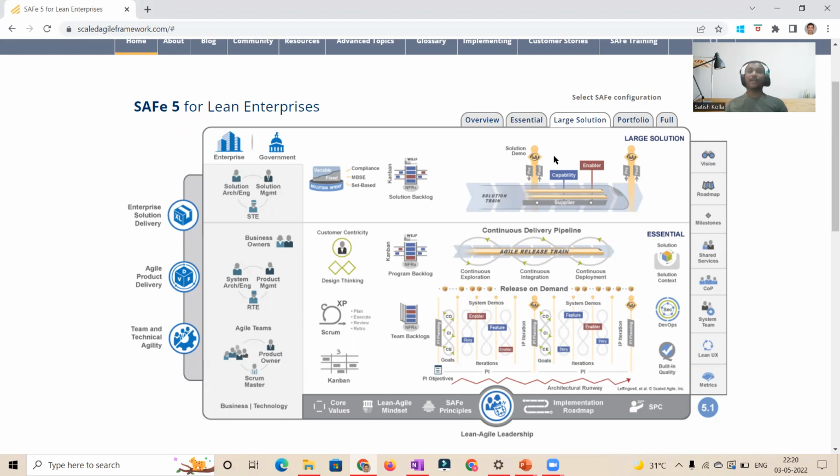third parties, vendors, suppliers. By taking that as a baseline, we will be passing that to the release trains, where the release trains will be doing the planning, taking the dependencies and everything into consideration. Once the planning is done, again we'll be touch basing and making sure the vendors are aligned with our dependency timelines as part of the post-PI plan.